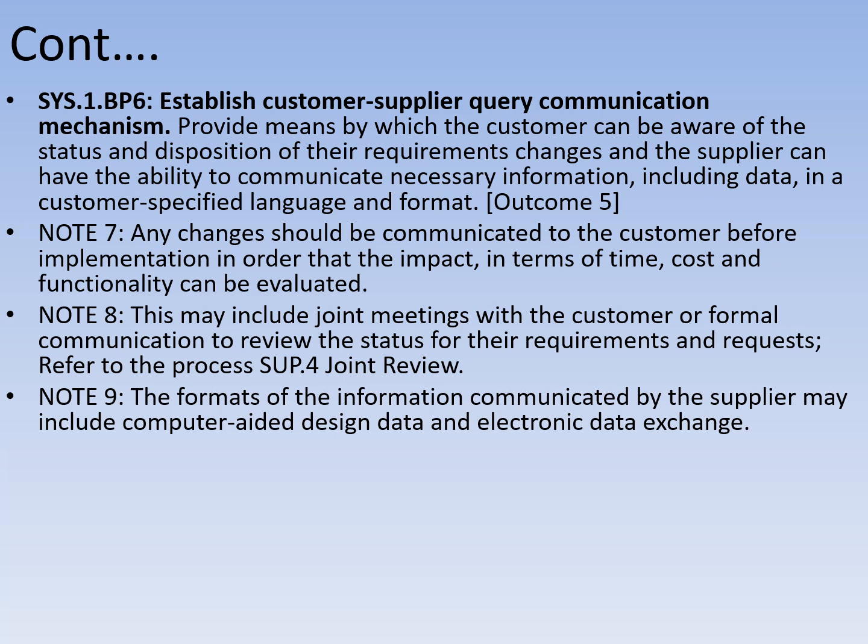It should not happen that he uses a word and you interpret something, and you use some different word and the customer interprets something else. This should not happen. So a clear-cut channel of communication must be established, and any changes should be communicated to the customer before implementation, so that the impact in terms of time, cost and functionality can be evaluated.